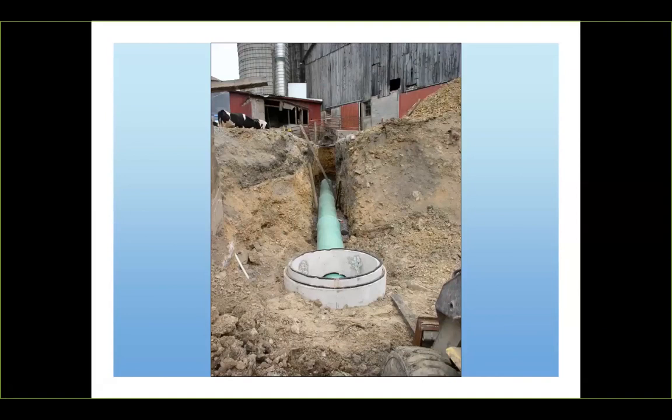Double check with your design approver for all field change requests. They're going to ask you on site if we can do this. That's a design change. You need to get proper approval, because the person with the appropriate design approval authority has to make that change.